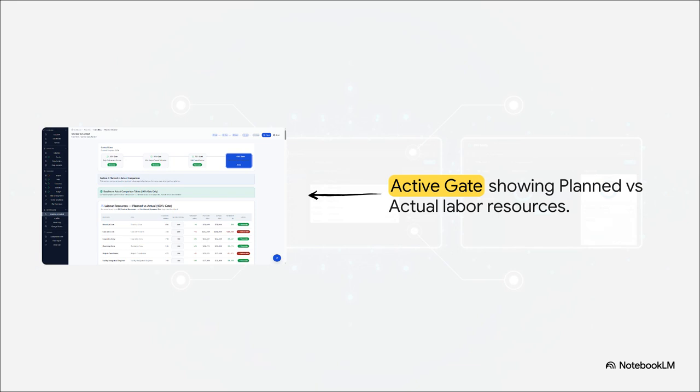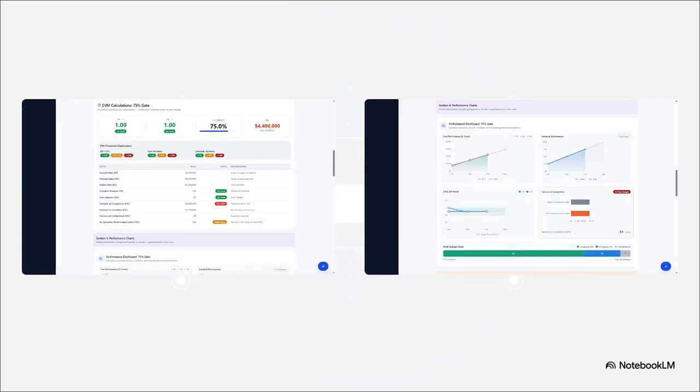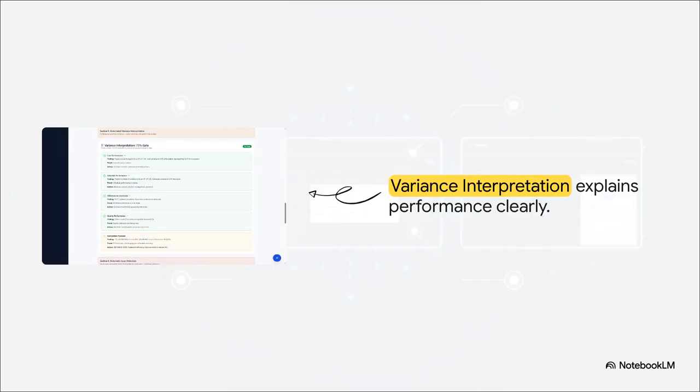Below that, down in the Labor Resources section, this is where you input those actual hours and costs into the editable fields. As soon as you do, PM Molly instantly calculates all the dollar variances and flags them as favorable or unfavorable. And this right here is where the AI really flexes its muscles. Your raw inputs instantly power these real-time, fully PMI-compliant threshold classifications. You get immediate, crystal-clear visibility into your cost performance index and your schedule performance index. Plus, the AI generates these beautiful executive-level S-curve performance dashboards, visually tracking your planned value directly against your earned value and actual costs.